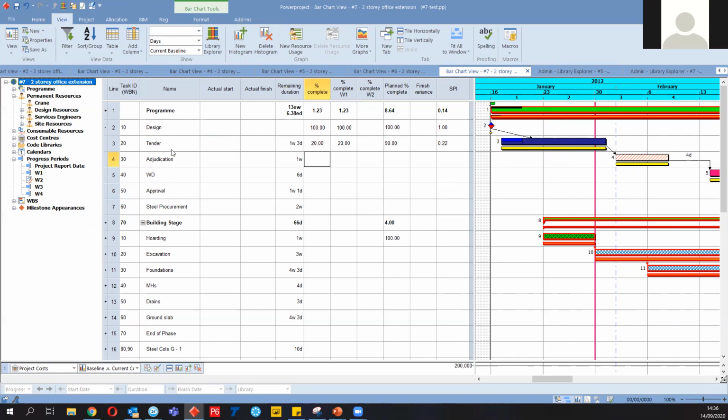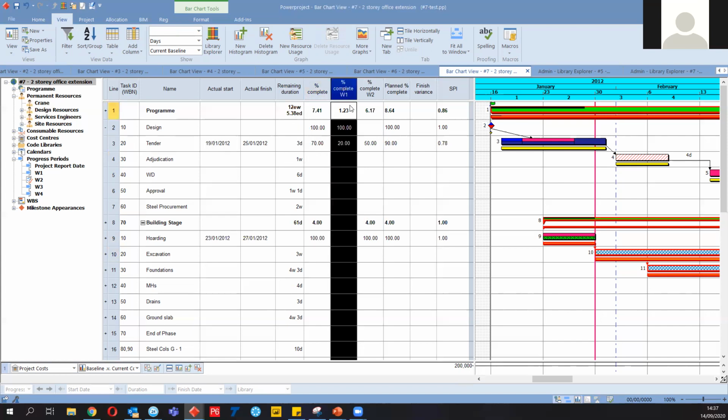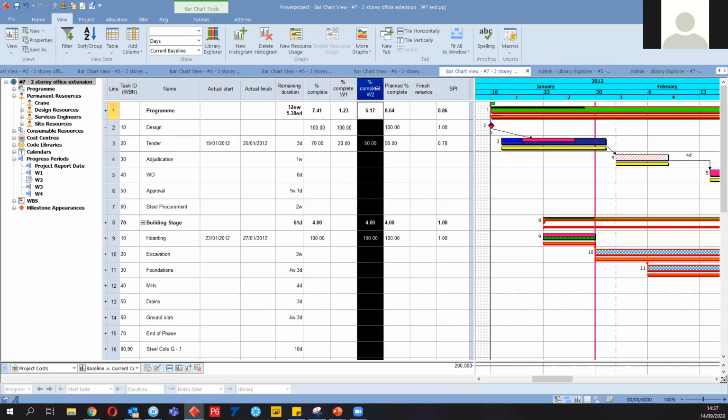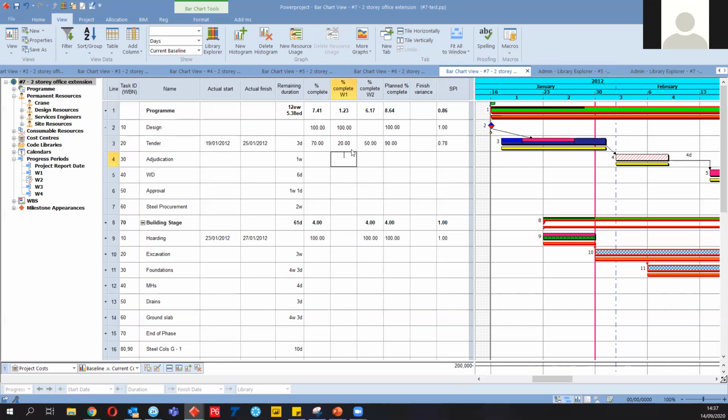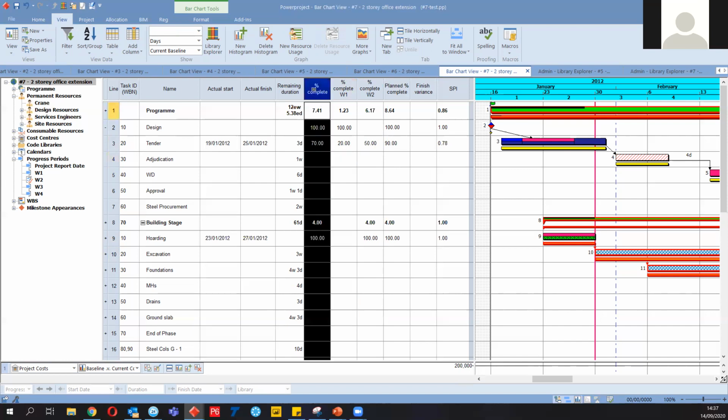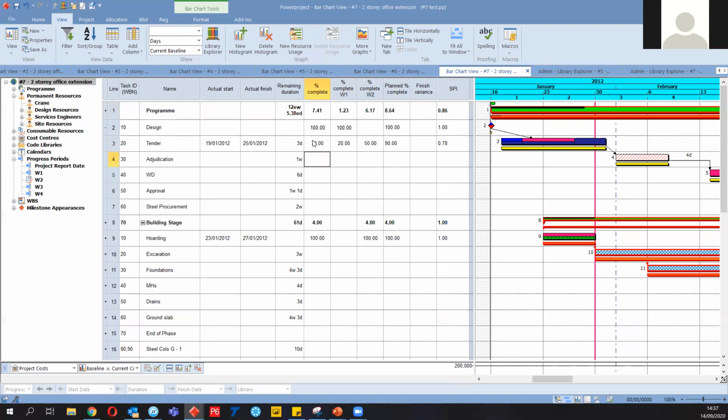and we can move to the second week, and this time the tender asks to complete 90% or not. Let's say it is 70%. So you see that according to 70%, with the color of week two, we're going to display this type of completion. And also it says, okay, so this work should be completed too. And once we input 70% for the standard, you're going to see the percentage for week 1 and the percentage for week 2, which can be calculated differently, and we'll only see the percent complete in a cumulative format.